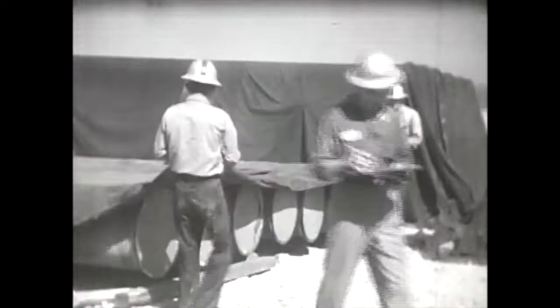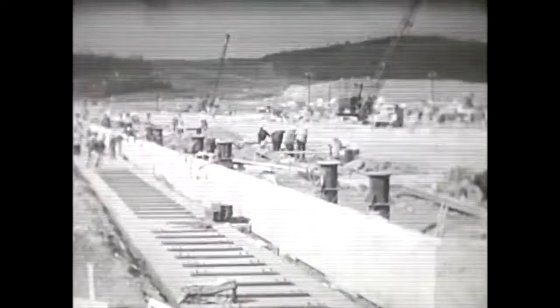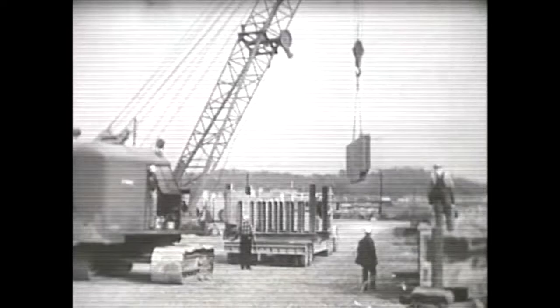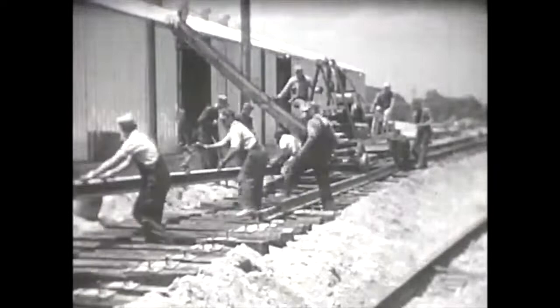At this early stage of the project, a number of activities took place almost simultaneously. Perimeter roads were built around and through the site to allow easy access to locations of construction. Truck alleys needed for plant operation were constructed to facilitate movement of materials and supplies into buildings. Use of precast beams set in place by cranes meant a great saving in time and money. This technique eliminated congestion during construction and reduced the formwork that would have been required to pour the beams in place. In addition to the truck alleys, 22 miles of railroad track and 25 miles of roads were laid inside